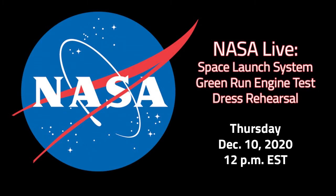The only other thing I will add, we're also working with Aerojet Rocketdyne on the drying of the engines. That's a procedure we do have to complete before we leave Stennis and ship to KSC. So Boeing's working very closely with Aerojet Rocketdyne on that, and actually understanding a little bit more what we can do there. So we're actually seeing some improvements in the amount of time there in the schedule. Some of this is really just laying out the specifics and the details and seeing how we can do a lot of the TPS work that Mr. Honeycutt talked about in parallel to the Aerojet Rocketdyne engine work that we have to do before we can ship. So that's all coming together very well, and we understand that process very well right now.